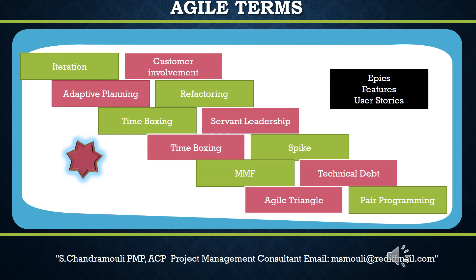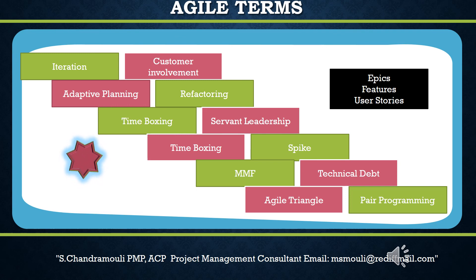User stories are much smaller than usage requirement artifacts such as use cases or usage scenarios. They are captured in a dialogue format that anybody can understand easily. The three parts of user stories are: card, conversation, and confirmation. In agile, stories are written in the form of a card — postal card size. The format of a user story is: as a [role], I want to [feature] so that I can [reason/benefit]. This is essentially the format of who, what, and why.